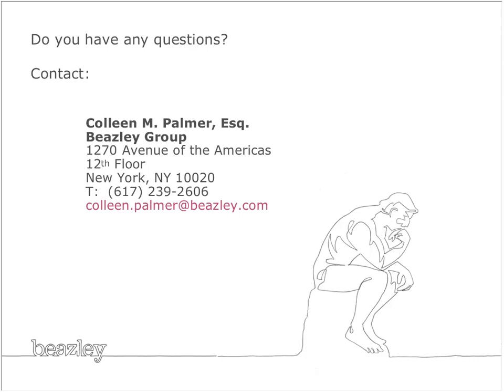Moving on, it says, can you expand on the non-binding mediation recommendations? Yeah. So non-binding mediation is a dispute resolution process where the parties get together with a mediator, and attorneys are usually there, and the parties present their arguments. Typically thereafter they're separated, and the mediator will meet with both sides.